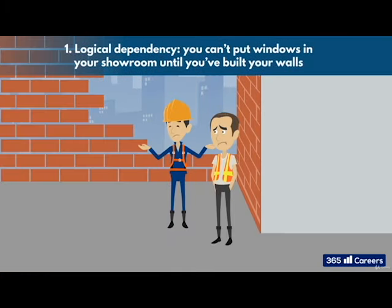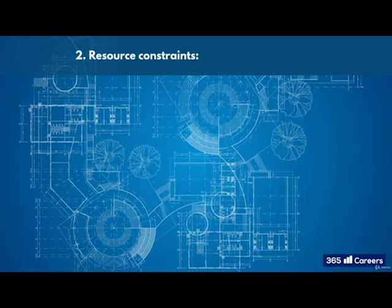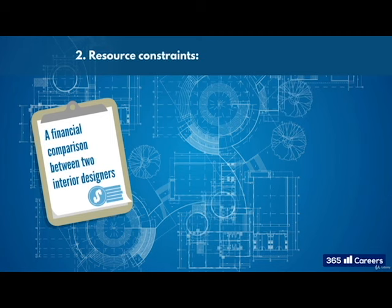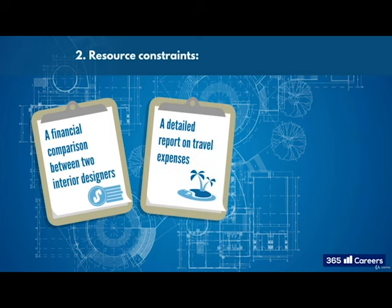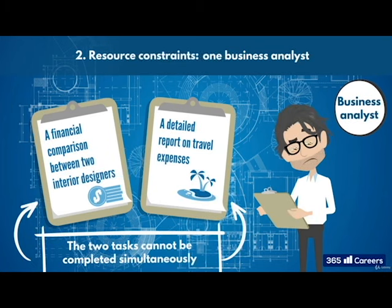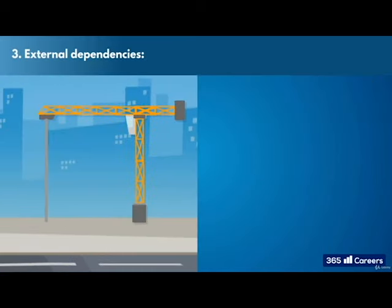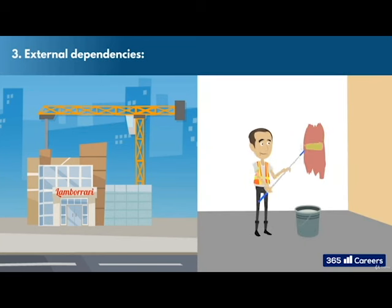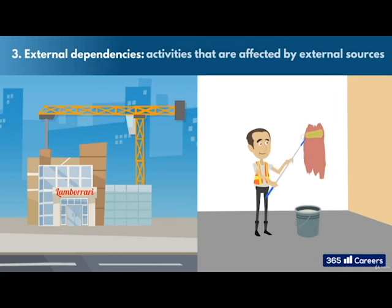First, logical dependency. This is just like what I described. You can't put windows in your showroom until you've built walls. Second, we've got resource constraints. Lack of resources can affect the sequencing of tasks. Let's say you have two work packages as part of your showroom project. One for performing a financial comparison between two potential interior designers, and another for preparing a detailed report on travel expenses. But you only have one business analyst, and nobody else qualified to perform the tasks. The two tasks cannot be completed simultaneously. Therefore, your business analyst has to finish one before they can start the other. Third, we have external dependencies. These can be anything from building work that needs to be signed off by the city, to paintwork that can only be done in good weather. You get it. The activities that are affected by external sources.